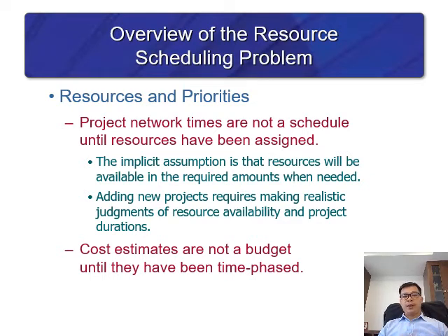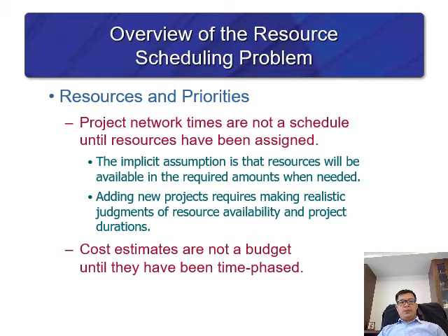But the time that we create is not a schedule until we put resource into each task. Because the resource has capacity, when we put it in, it becomes the schedule. For the cost estimate, it is not yet a budget, but it will be.